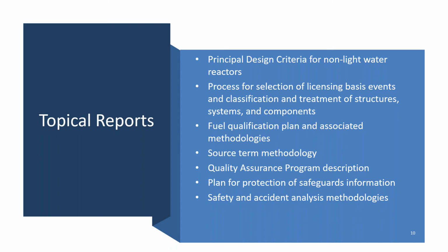Regarding quality assurance, what we're asking applicants, in order to get the full benefits laid out in the paper, is that a quality assurance program description topical report should be submitted to the NRC in the pre-application phase to ensure that your design and the application that you're developing and that will be submitted to the NRC is being developed in accordance with Appendix B to 10 CFR Part 50.